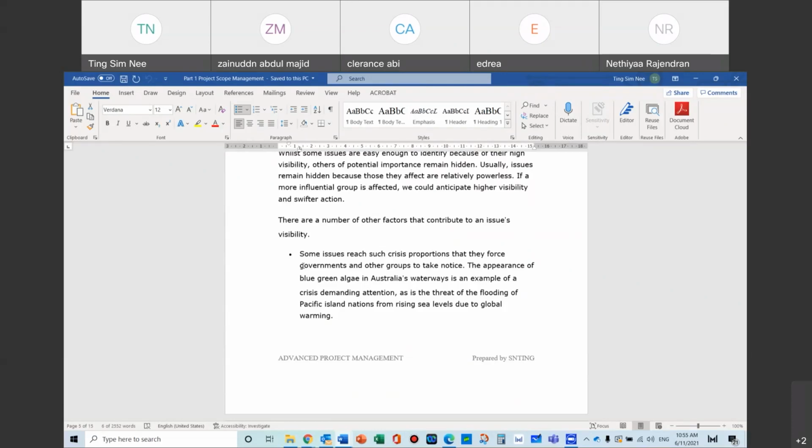Is there any international law, legislation, or local law and legislation, like the land code, that will actually affect the efficacy of the project later, and even affect whether it's going to be a go-ahead or not, you see? So let's say you're looking at an area where you're going to do the development. One of the issues will be the land: whether this is agricultural land, mixed zone land, or native land. All this will be dealt with very differently, you see?